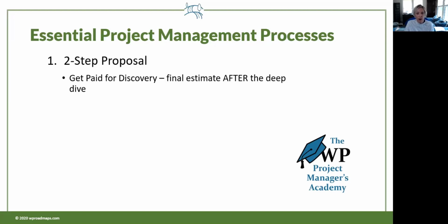Issues management. You need to have a plan for how you're going to deal with issues when they come up. It's a little bit hard to articulate the difference between issues and risks, but issues are things that you couldn't possibly have foreseen that just pop up in the middle of a project, like a pandemic. That would be a good example of an issue and not something you could maybe attribute to risk. Although maybe you could now that this has happened, now that probably becomes a risk that you want to incorporate into your risk management plan, which is on the next slide. So we'll talk about it in just one second.